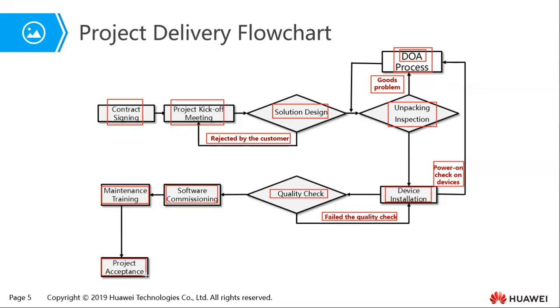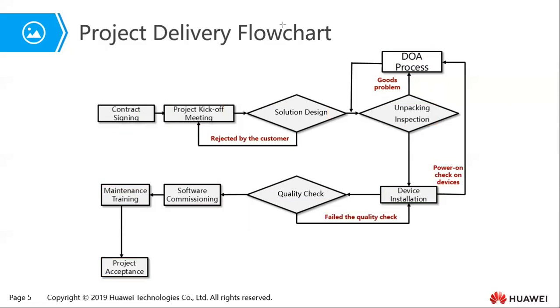And lastly, on the flowchart, we have the project acceptance. Project acceptance. So here really you're handing over the entire project to the team. They're verifying that everything is as they had agreed on the contract. Then you'll be able to sign and receive what we call a project completion certificate.